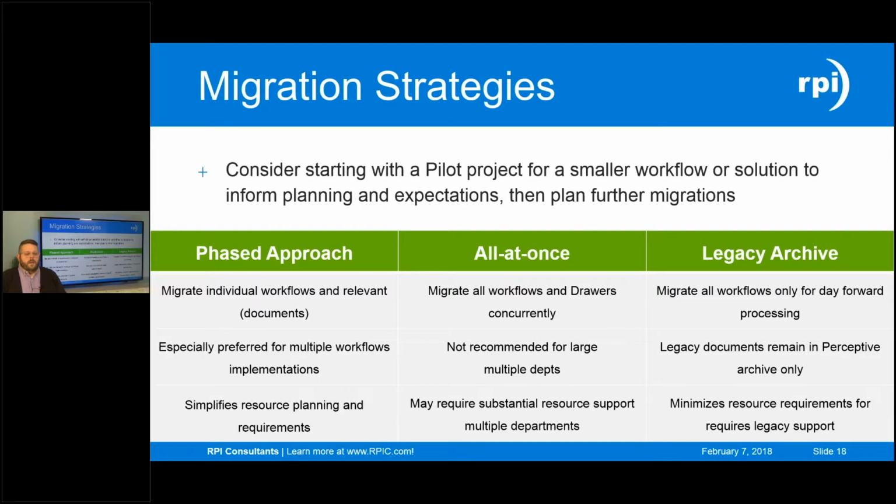Regardless of what approach you take to a migration, you might consider starting with a pilot project. A pilot project would allow you to get your IT and infrastructure expectations in place, and it would be a less intense learning curve for users and your organization as a whole.